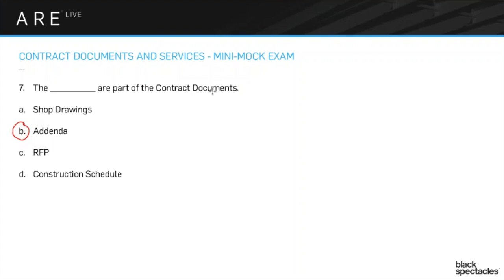Contract documents is an interesting term. Contract documents essentially means: when you produce a set of drawings — both the drawing set and the project manual — what you're making is somebody else's contract. You're making the materials that will define the contract between the owner and the general contractor. That's why we call them contract documents — you're aiming to make their contract.